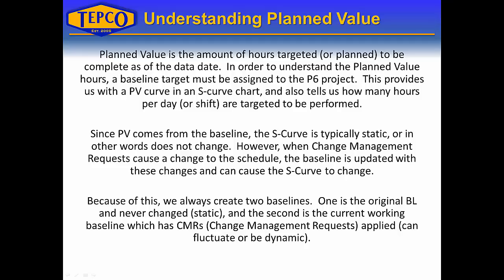Before we get started in P6 and Excel, let's talk about the different components of an S-curve. Plan value is the amount of hours targeted or planned to be complete as of the data date. In order to understand the planned value hours, a baseline target must be assigned to the P6 project.